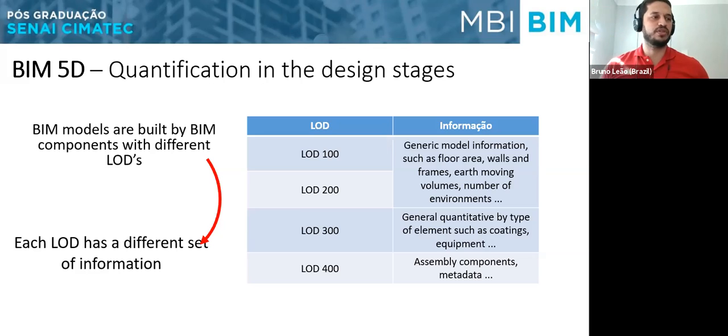And when we have LOD 400, we have assembly components and every kind of metadata. And we can even create a link between the stages of the kinds of budgets that we're trying to develop and the LOD of the model.